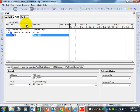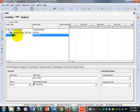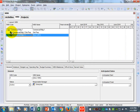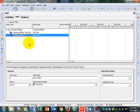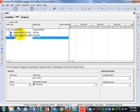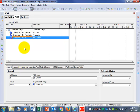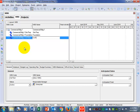Now add another WBS by clicking Add. It automatically indents and puts another one below — but we don't want it indented. We want it at the same level as Site Prep. Come over to the right and click the arrow that says Move Left. You'll notice the two line up. Now start typing 'Foundation' for both the WBS code and WBS name. Hit Plus again and create another WBS called 'First Floor,' again using Move Left to align it.